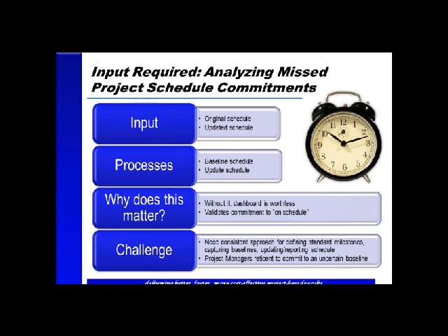They don't quite understand exactly how the schedule gets updated. They don't understand, for example, that when I mark a task 100% complete in Microsoft Project, Microsoft Project, in fact, copies my schedule date to my actual schedule date. So if I had no variances in my project plan, if I mark a task as 1% complete, Project says you must have started, so it copies the scheduled start date to the actual start date. When I complete it by marking it 100% complete or changing remaining work to 0, it copies the estimated schedule date into the actual schedule date.